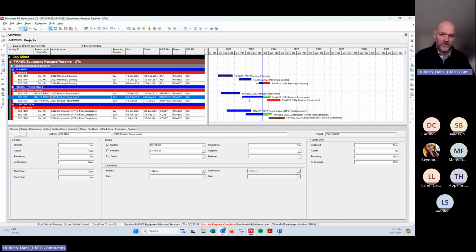In the UTA environment, and we just had some discussion about this a week or two ago, we are updating the baselines pretty frequently, usually with every single update. There is some debate, or there are cases where that's not actually useful, and we might want to maintain a baseline from previous.